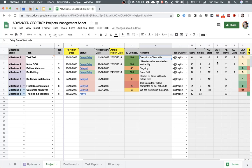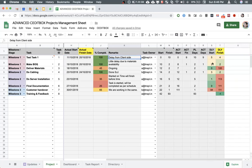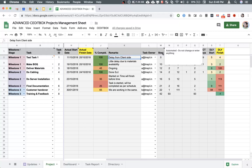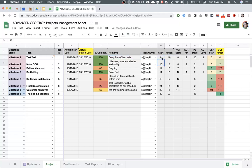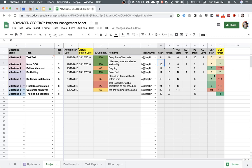These are automated columns. I would request you not to touch these. This represents the start, the finish, how many days from start, and how many days for finishing this particular task. Actual start, actual finish, the planned days, actual days, and how many days there was a delay in starting the job and finishing the job. All of this is used to create the Gantt chart. There's nothing you need to do manually here.